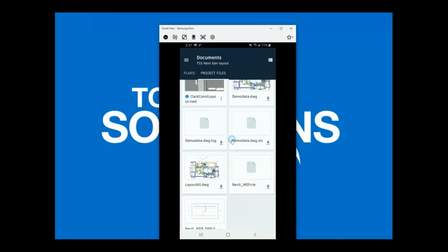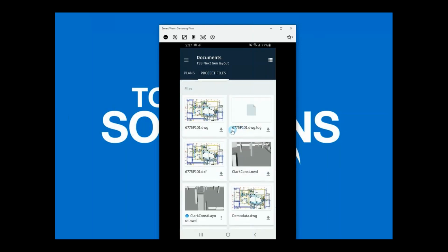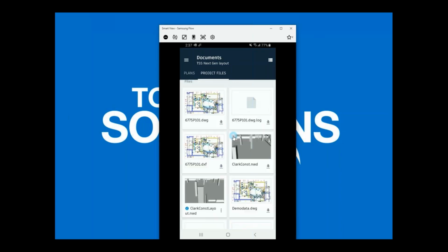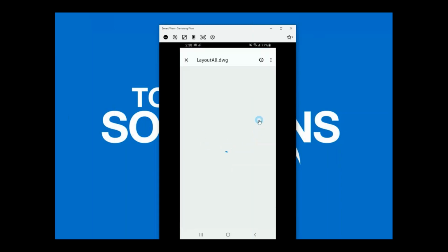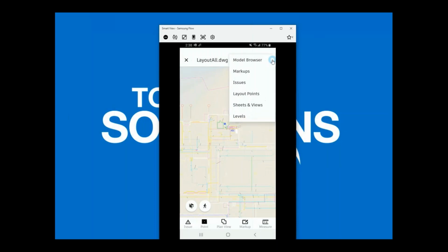And then, as we're going to walk through here in a second, as we're talking about utilizing this data, before we weren't really able to create points or information in the field and then share it back. But in the new version of BIM 360 Layout, that's exactly what we can do. If our field teams need to update information or verify placement, taking measurements, or creating points and saying, okay, it was supposed to be here, this is where it is now, the engineers can go ahead and validate or verify that the drawing, the design is right, and then move forward.